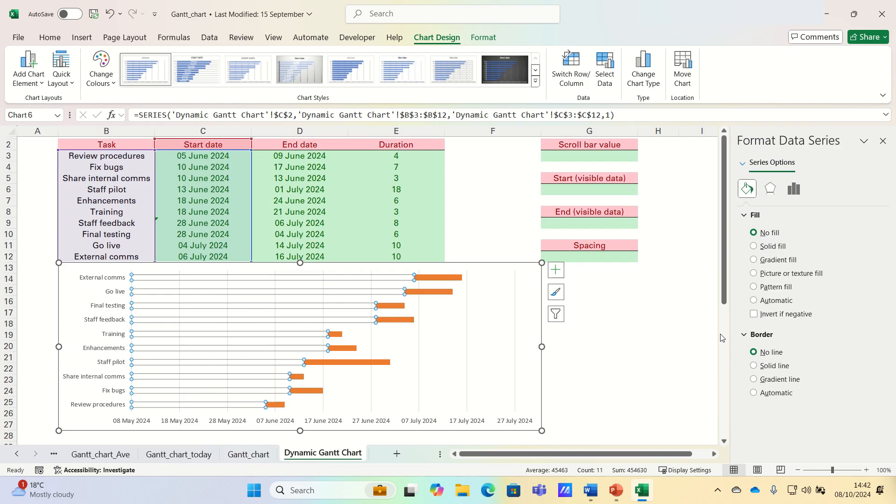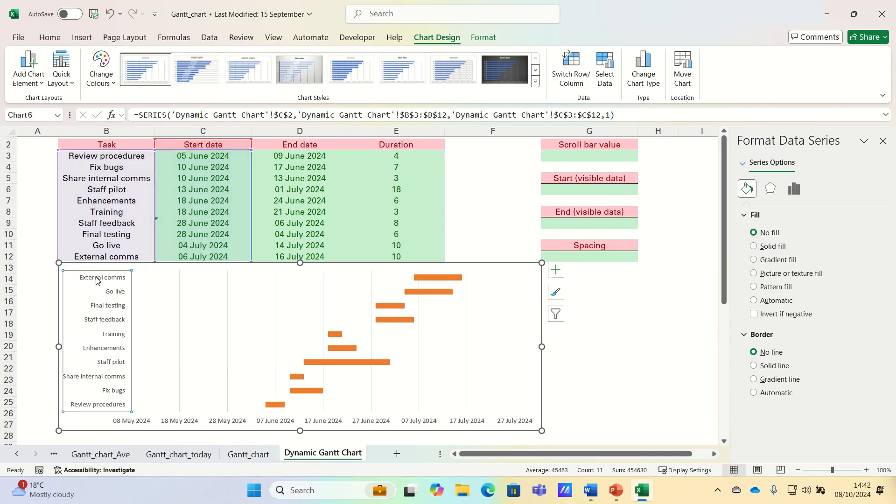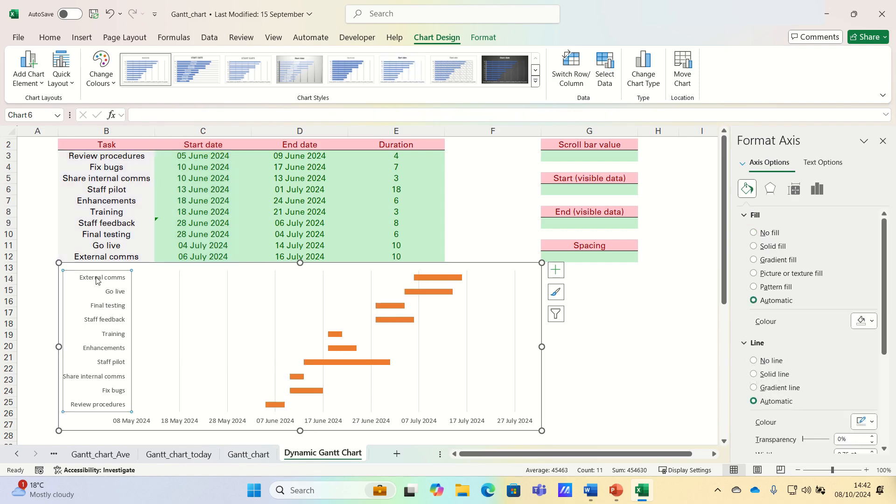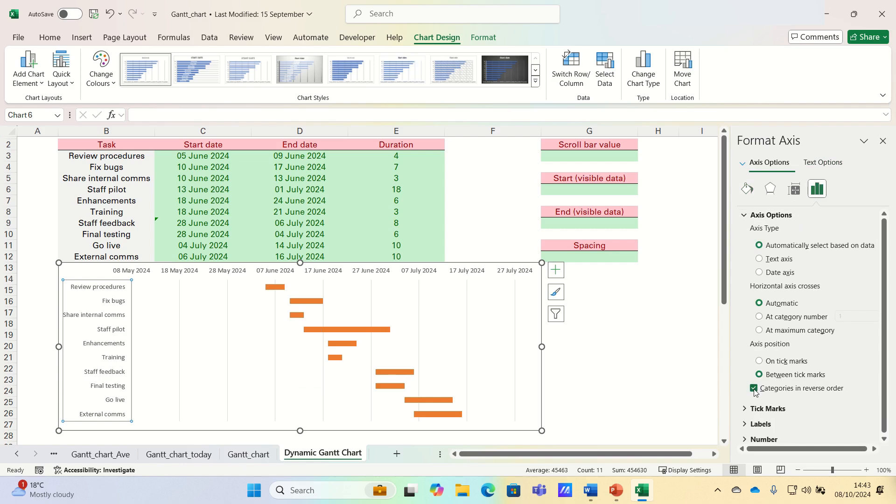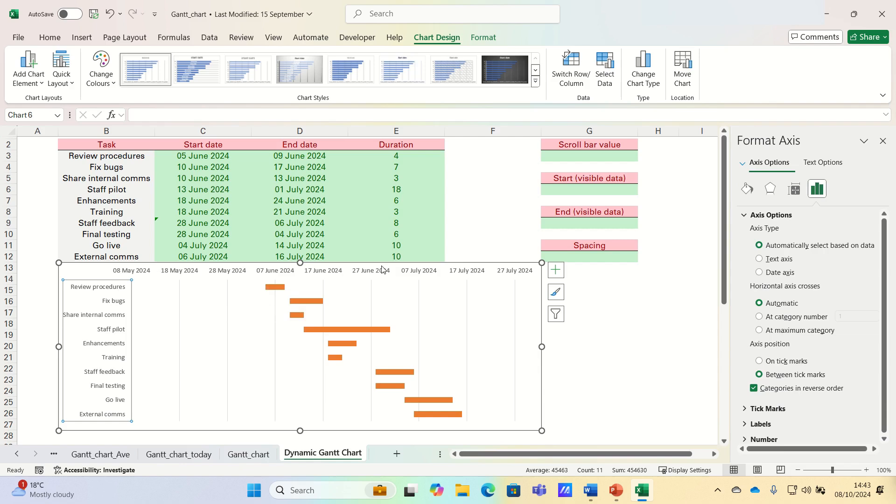You'll also notice that the tasks in the Gantt chart are in reverse order. To overcome this, click on the tasks and then select the categories in reverse order option. Therefore, the tasks are now arranged in chronological order and the axis containing the dates has been moved to the top.